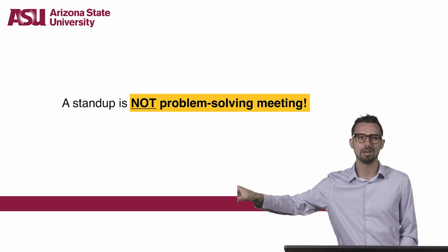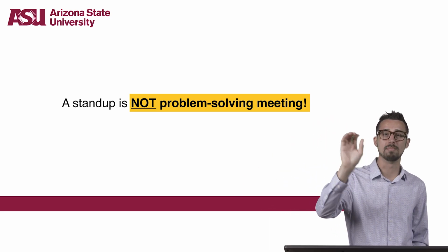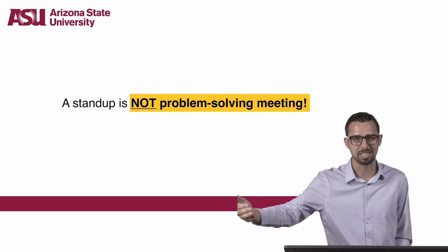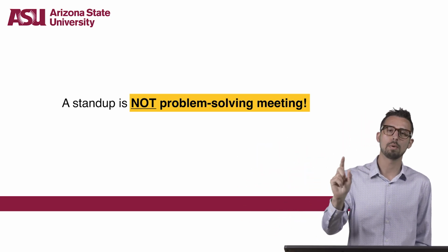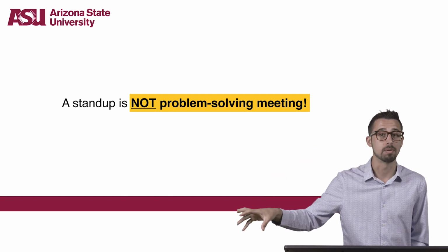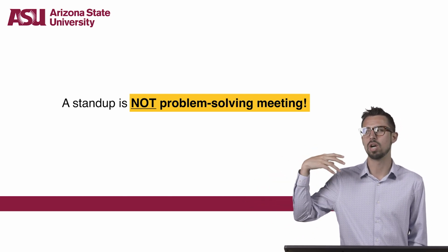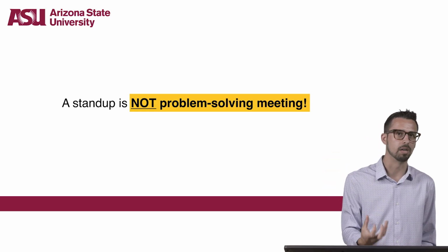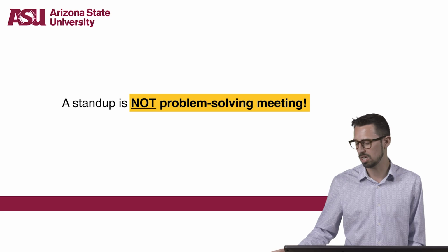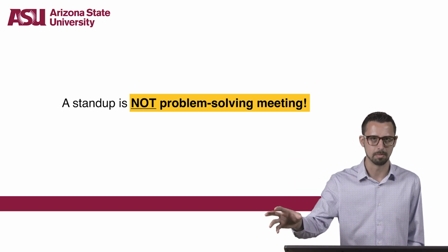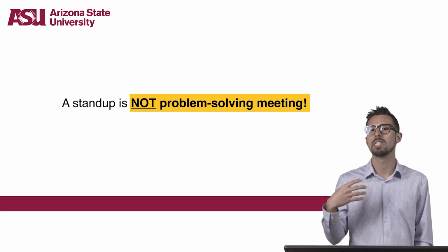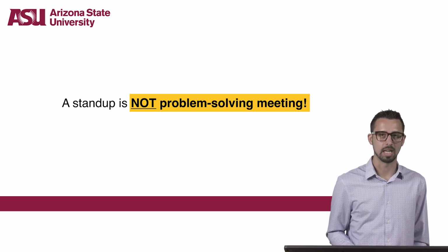Just sidebar that conversation, and then create another meeting for that topic, which, frankly, that meeting could be right after the stand-up. But solve the problems in that meeting where you are not holding up team members who maybe do not absolutely need to be a part of that conversation. That way they can get back to the work that they need to do and not be inundated by meetings. The important thing here is that teams really need to run their own stand-ups.